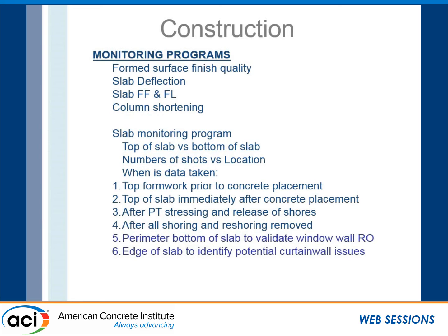We have a document that we create where we set all our control points. We're going to take data, and we share that with the design team so they know what we're recording and when we're recording before we start this.